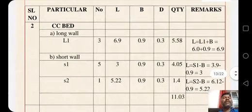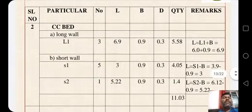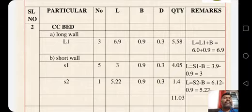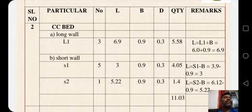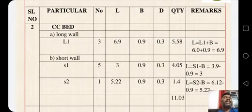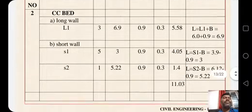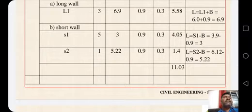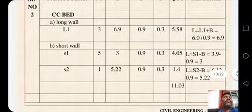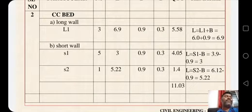Second item: CC bed. Long wall L1 — the length is same as before: 6 plus B = 6.9 meter. Width of CC bed is 0.9 meter, depth is 0.3 meter. We multiply 3 × 6.9 × 0.9 × 0.3 = 5.58. Short wall S1 — 5 numbers, length 3 meter, 0.9 × 0.3 = 4.05. S2 is 1 number: 5.22 × 0.9 × 0.3 = 1.4. Total quantity of CC bed = 11.03 cubic meters.